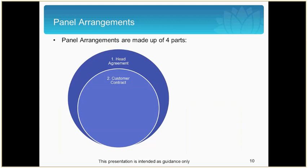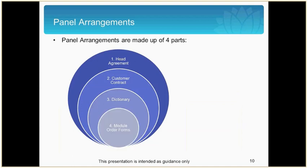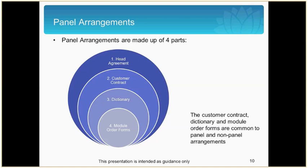In ProcureIT, the head agreement must be cross-referenced in item 7 of the general order form. Part 3 of the framework is the dictionary, which outlines the defined terms that the contracting agency and contractor need to be aware of. The last component is the modules and module order forms. There are 13 of these to select under the ProcureIT framework. The modules to be completed are dependent on the products or services required — for example, hardware and software both have separate module order forms.